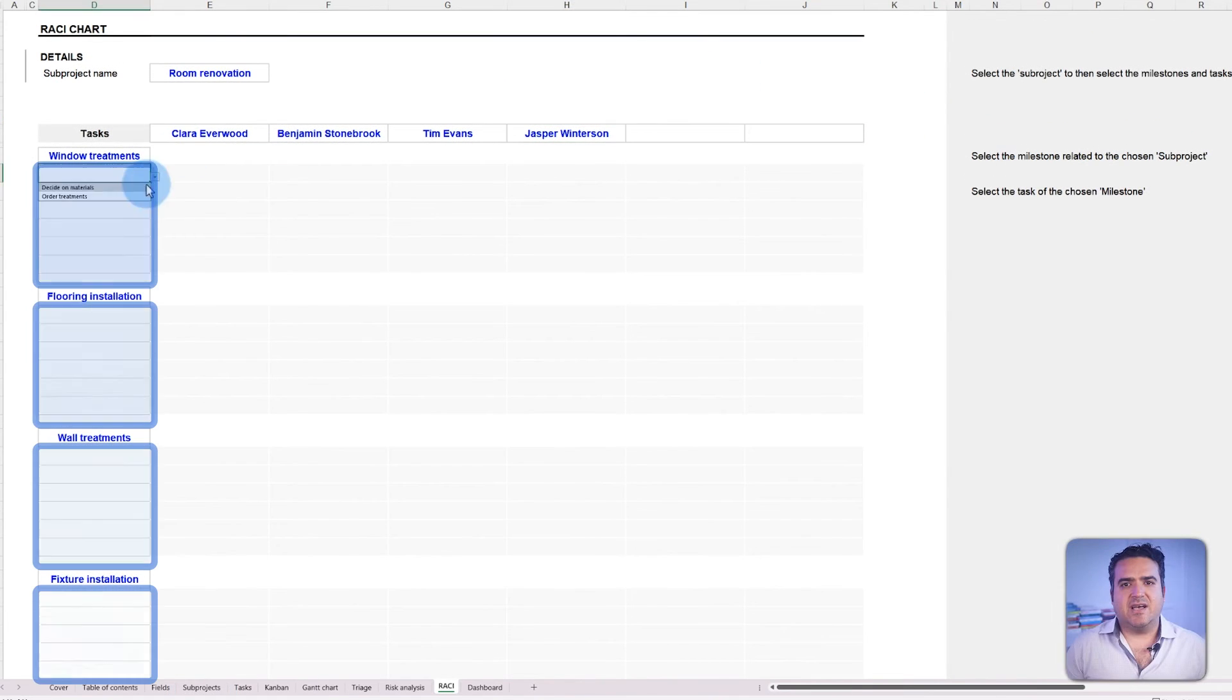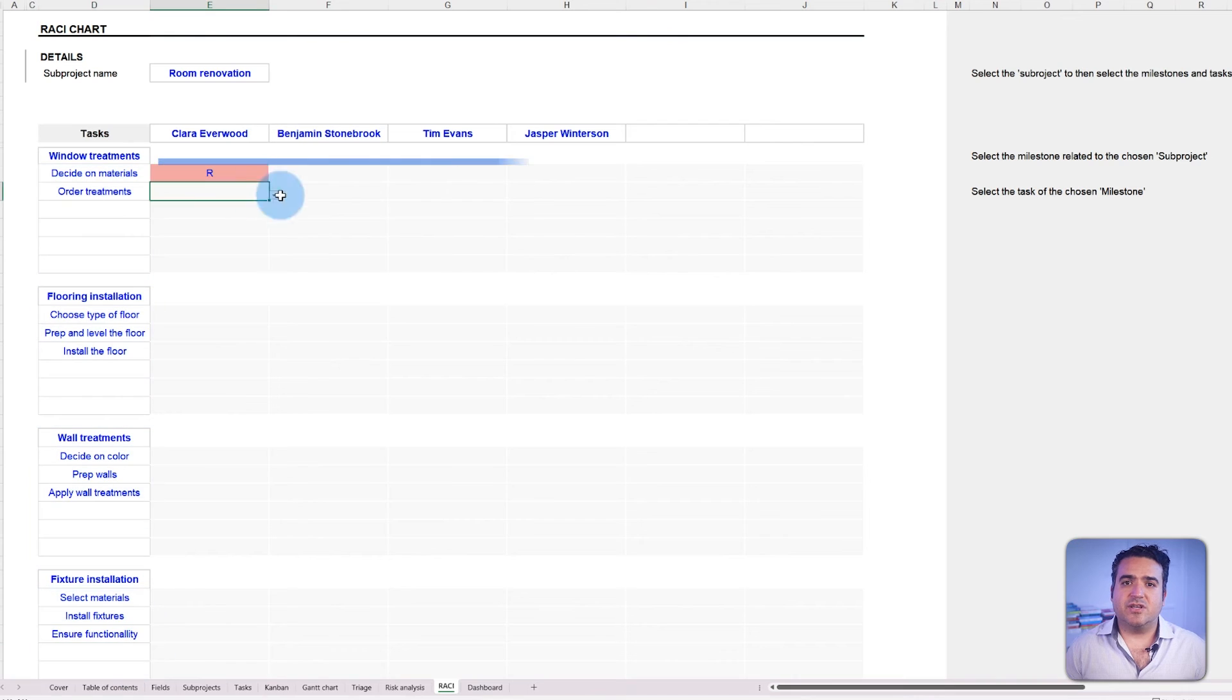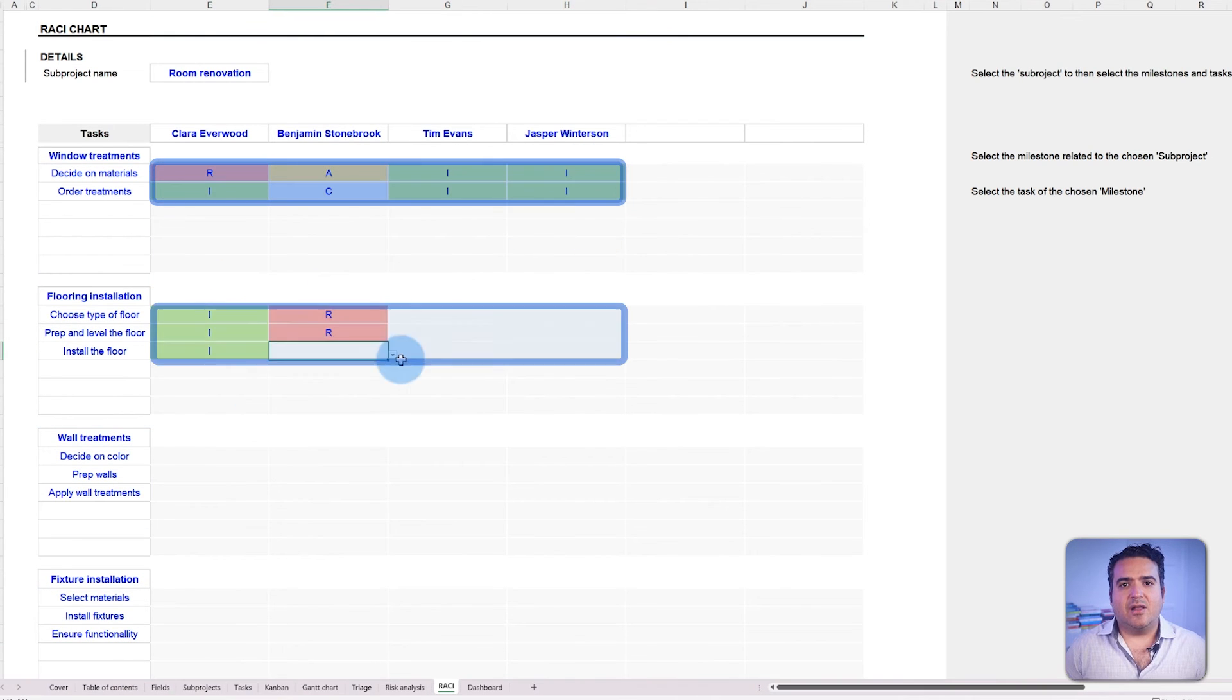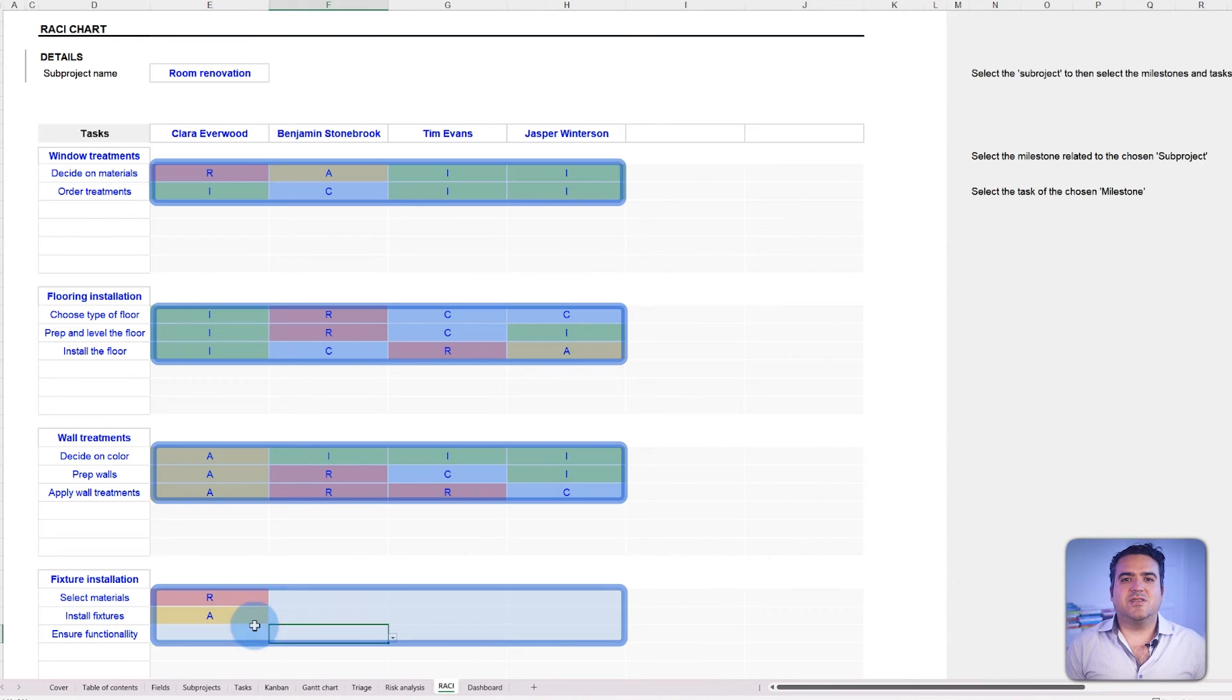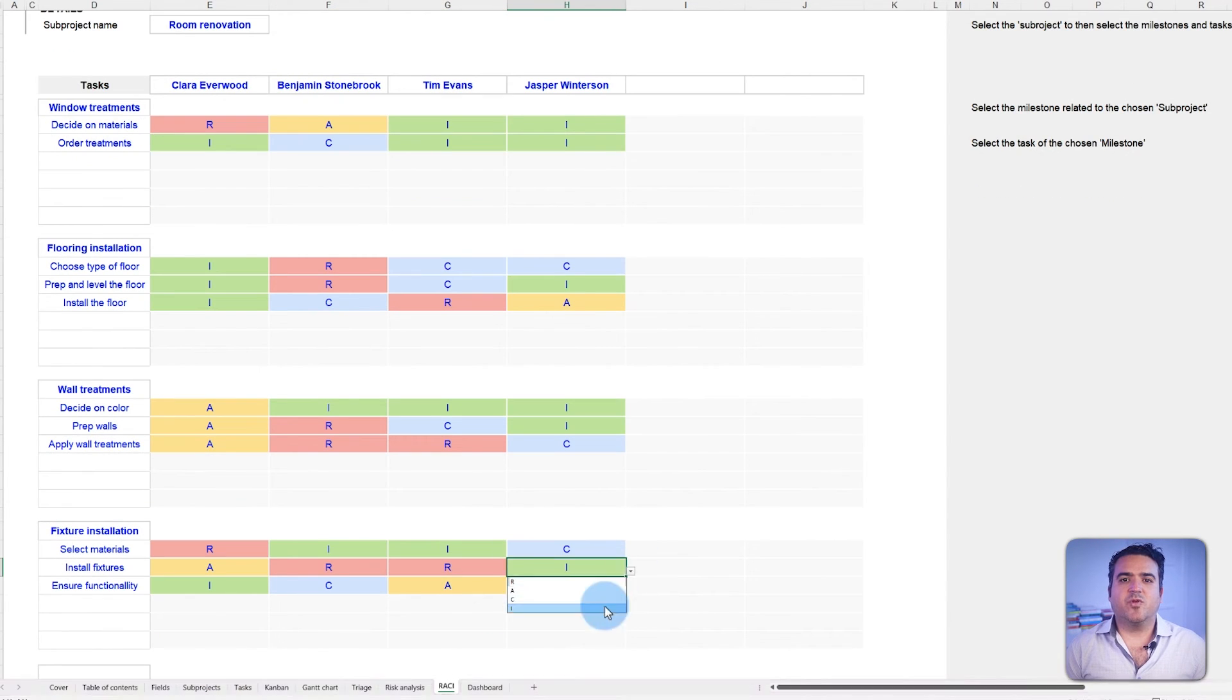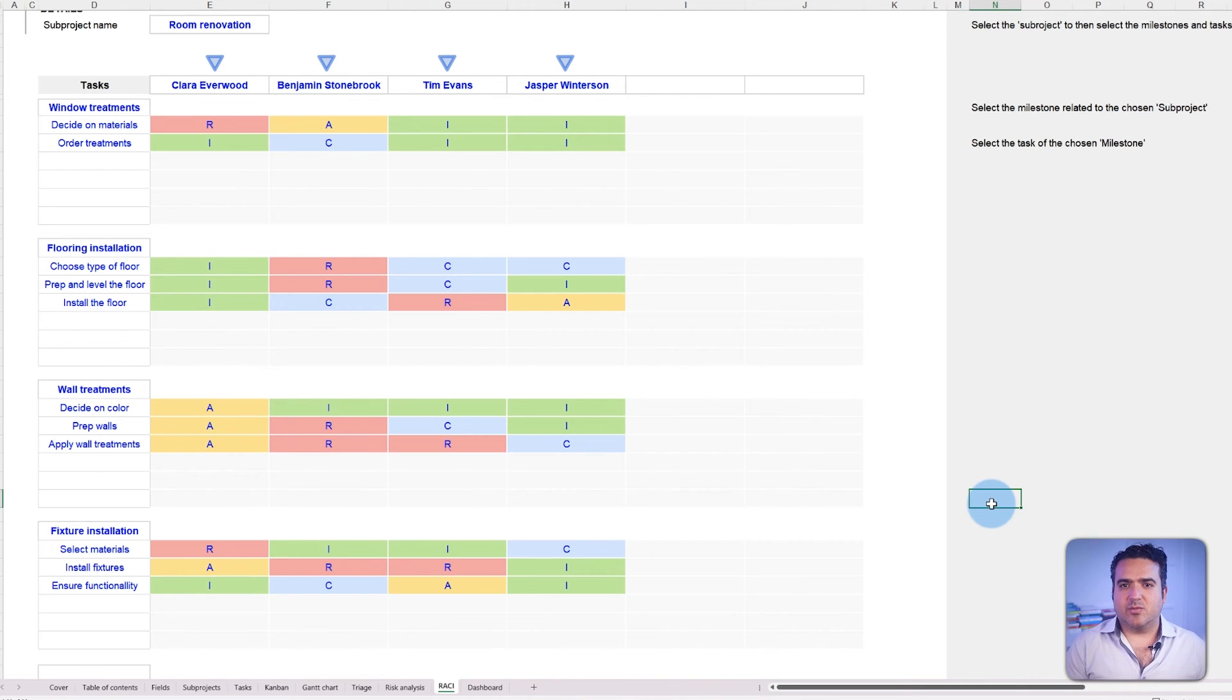Choose the tasks you aim to manage and for each selected task, allocate roles to your team members. This allocation determines who is responsible for what, creating a roadmap for every member's involvement during the project. By using the RACI tab, you establish clarity and ensure that every participant from stakeholders to executors understands the specific roles and the project scope.